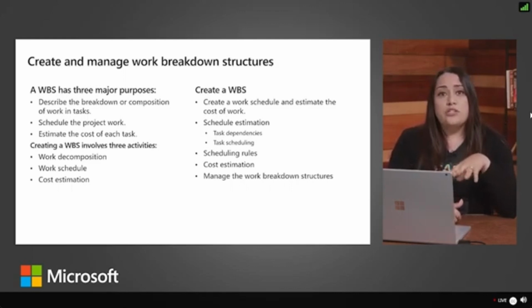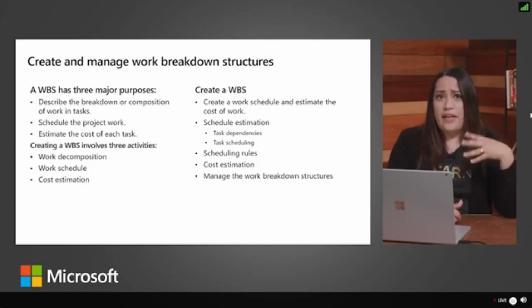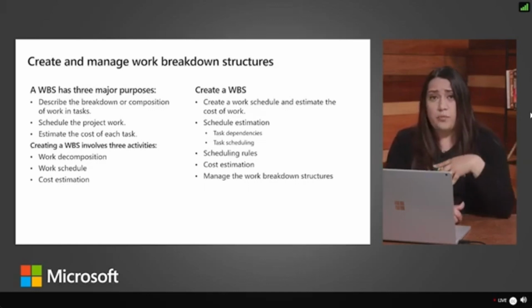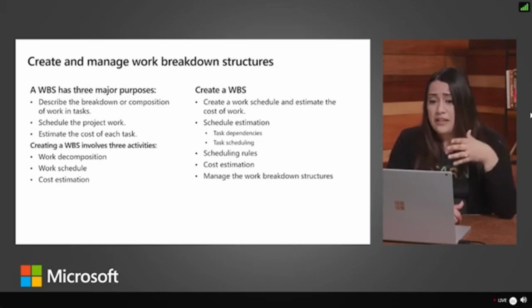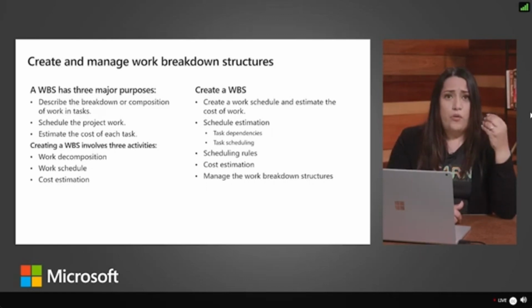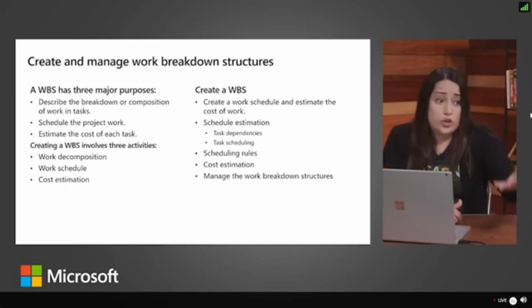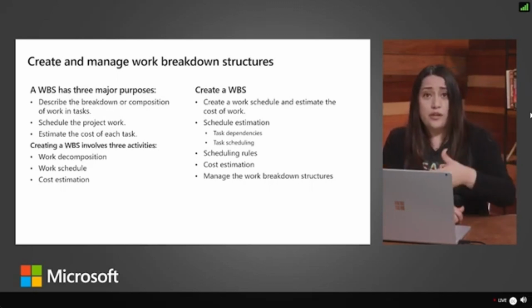And you can use WBS templates to create standard templates for projects. So let's say you have a project that you're offering quite a bit, and it has a lot of repeatable work. You can create a WBS template that makes it really simple to move from one project to another. So if you have a template from an existing project, all of that knowledge and those best practices that you gathered during the planning portion of the project, it's really simple to reuse on similar projects in the future.